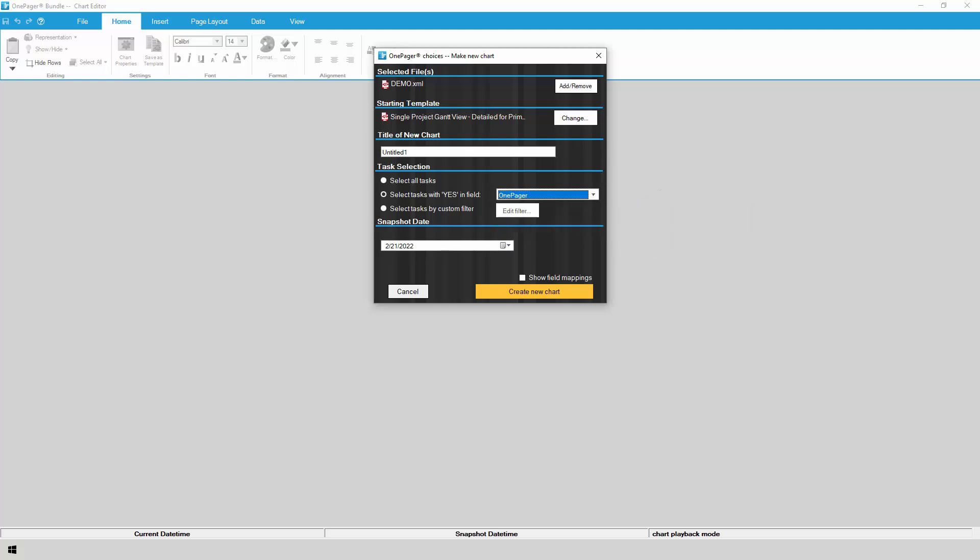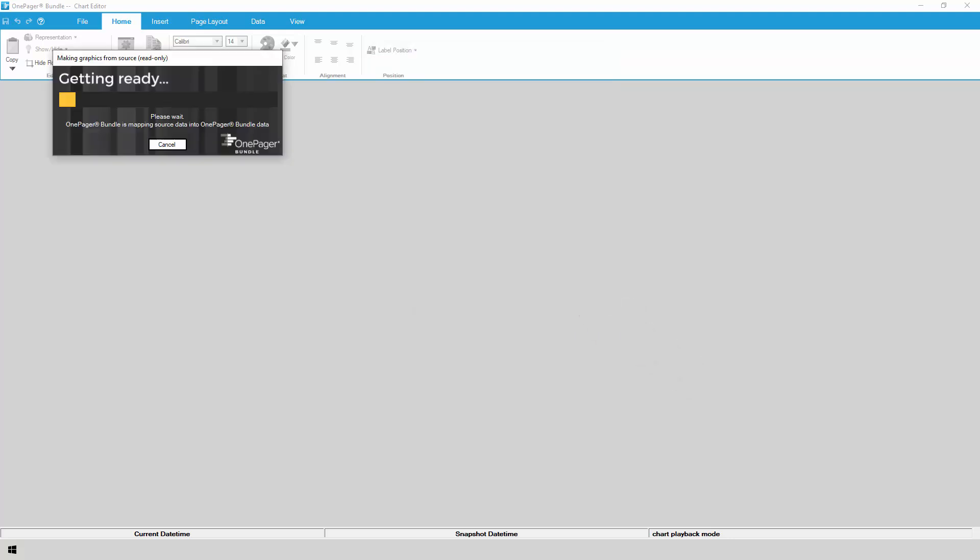Finally, choose the date of your snapshot, which serves as the status date of your chart. Over time, you can add multiple snapshots to your chart at different dates and track changes as the data is updated back in Primavera. Everything looks good, so we can click Create New Chart to kick off the import from P6 and build the OnePager chart.